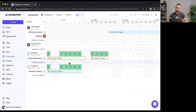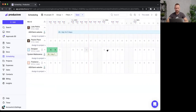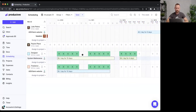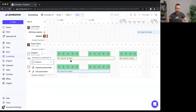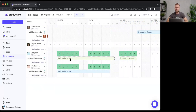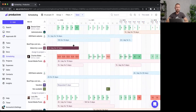I've created two placeholders: 'Designer' and 'Freelance Creative.' I can assign them bookings just like real people, to track how many people I should hire and when. If I do hire them, I can assign their planned work to the actual new person — saving me from doing the planning work twice.